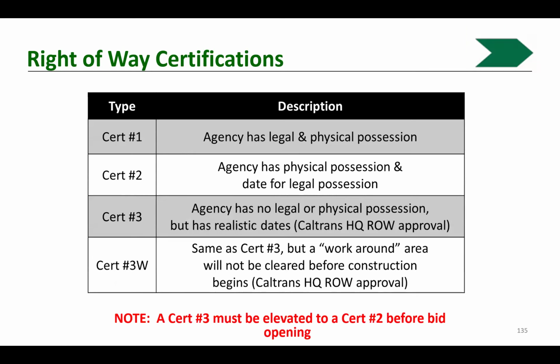And Peter, just to reemphasize, if you don't know for sure where all your construction funds are coming from, and there's a chance that they may be federalized, even though you're currently using local or state funds, you'd want to try to follow these federal rules so that if that federal funding comes available later, you're already ready to go. Otherwise, you have to stop dead and catch up and do NEPA, once you're already down the road. So just another thing to plan. It happens.